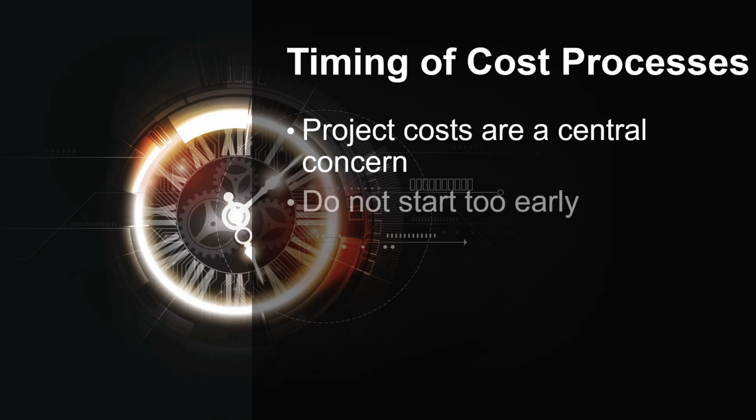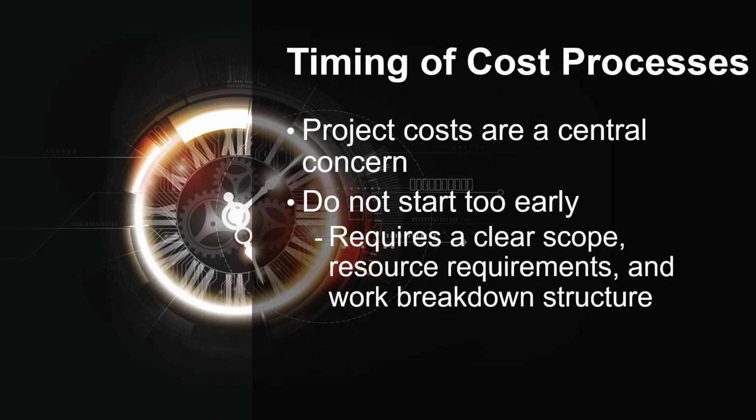You cannot develop a reasonable project budget until you know what you are building, the materials that go into it, who will be working on it, what they cost, and where the money will come from to pay for it. Therefore, there is a lot of work to get done before being able to start estimating what it will cost. However, if you wait too long, your stakeholders will lose confidence in your capabilities, the project's viability, or both.